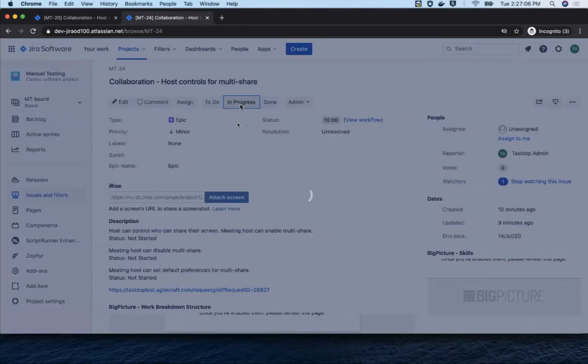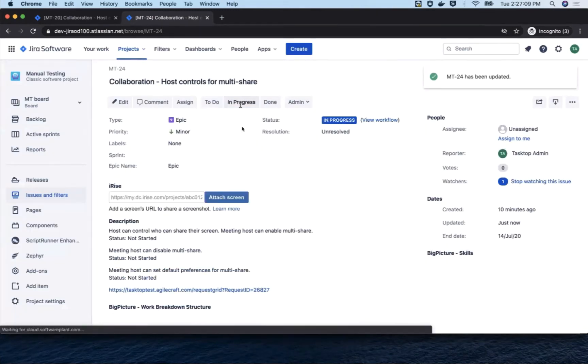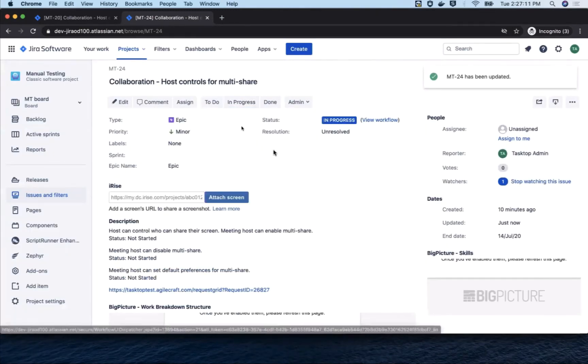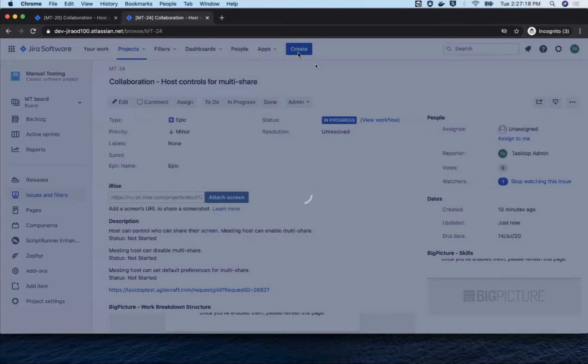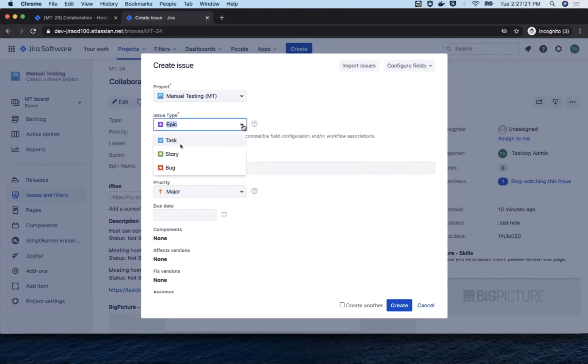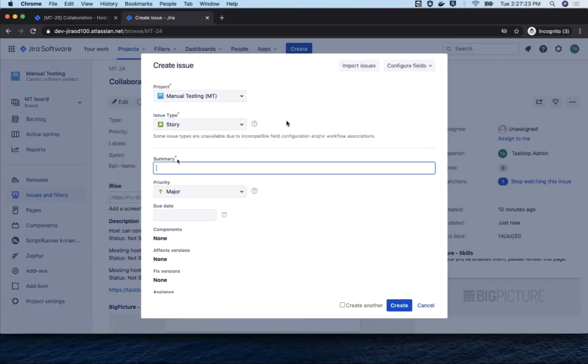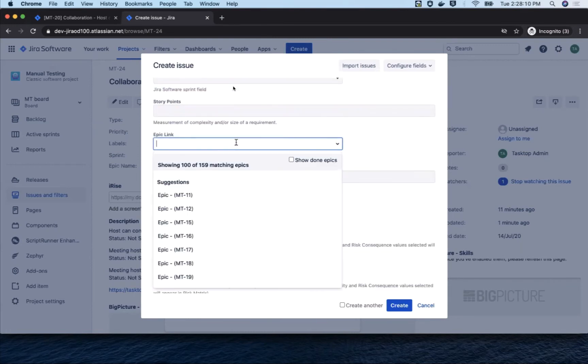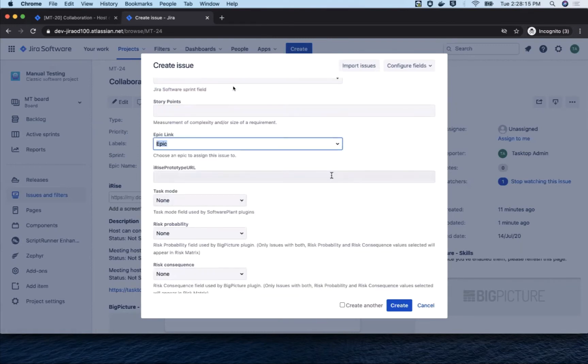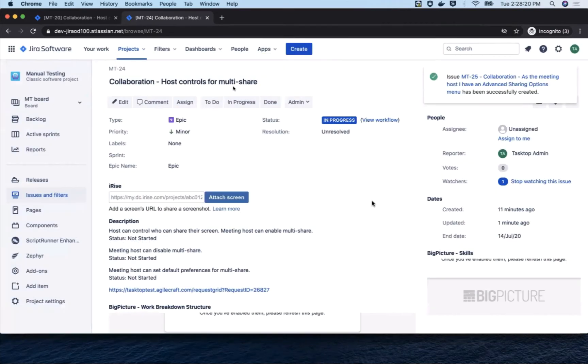So now we're going to change the status to in progress and begin story breakdown. We're going to create two stories. The first story is, as the meeting host, I have an advanced sharing options menu. We assign it to the parent epic and save.